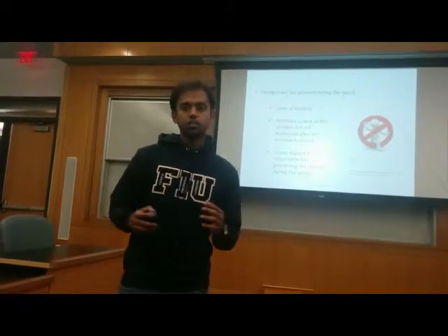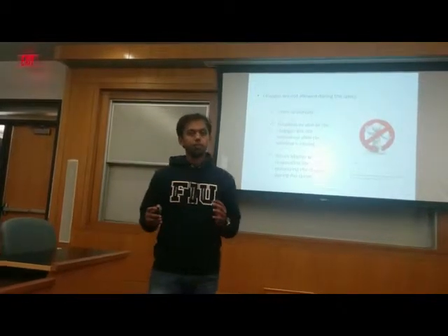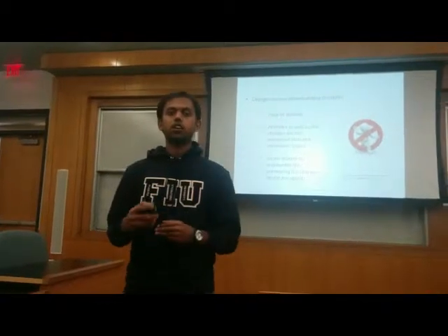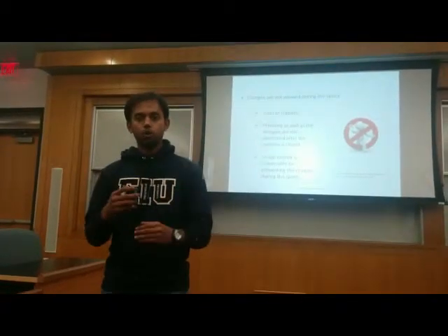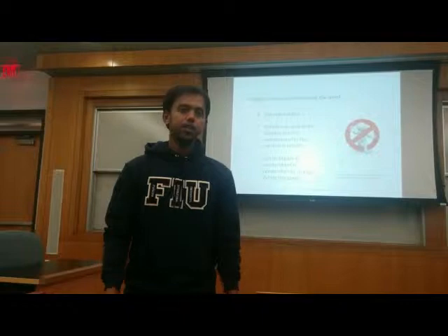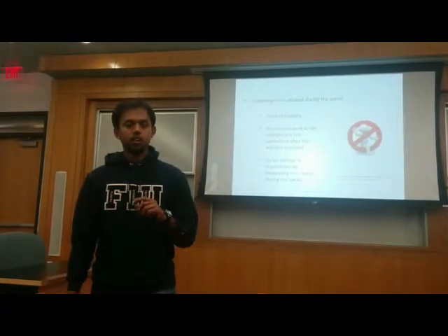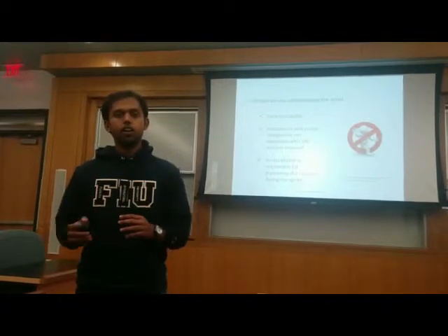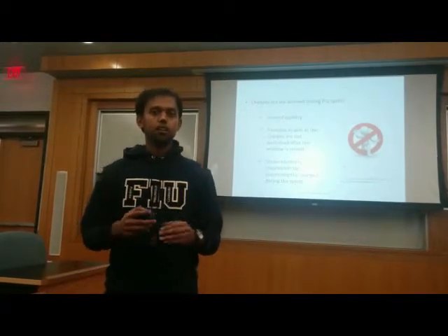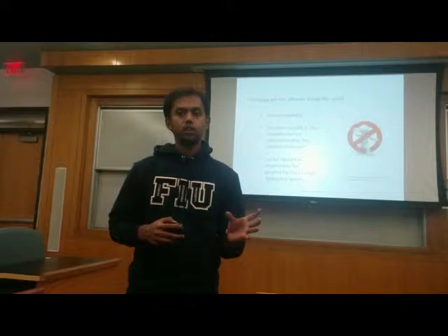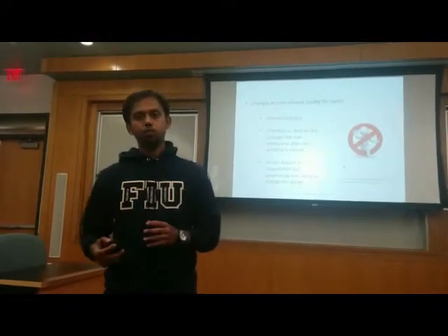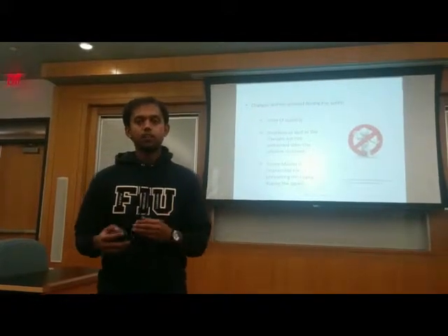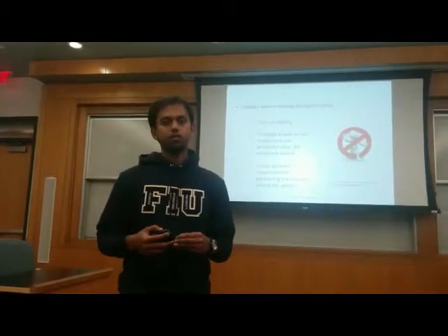The Scrum Master's role would be to prevent new changes from getting in the way. For example, if the product owner comes up with a new change in the middle of the sprint, it's the responsibility of the Scrum Master to jump in and say, hey, you have to wait till the end of the sprint. We are in the middle of implementing the previous sprint goal, so we are not supposed to take a new sprint goal, and we cannot affect the progress of the sprint goal.